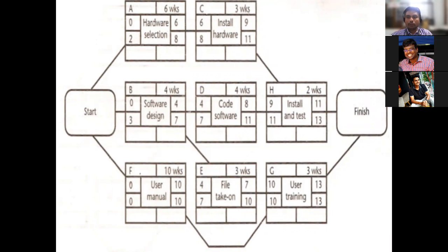So this is the way they calculate the CPM, the critical path method, where they identify the critical events and the critical path also. Here, if you see, F and G is going to be the critical path, and the remaining are all normal paths because we have a certain float value. With that, we can manage and run the show. Even if there is a delay, we can manage it. The only thing is we can delay up to only the value which has been given there.